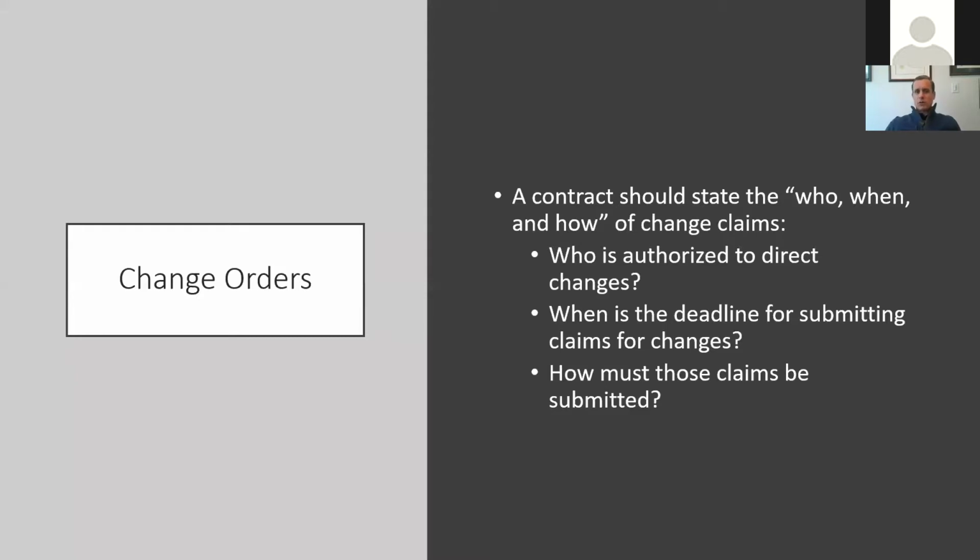When you encounter a condition, like we just talked about, that is different than the drawings or different than what you could have reasonably anticipated, and that condition is going to cause you to incur additional costs and additional time, and you intend to seek compensation for that from your client, you need to be aware that certain contracts give you a deadline to advise your client of that.